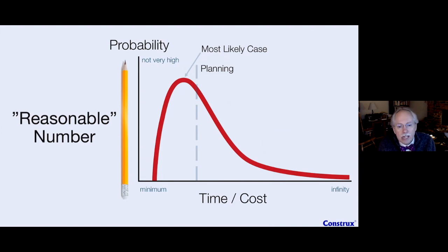It's also good for making decisions, right? Because it's a reasonable number to make decisions based off. And the kind of decisions we tend to make off the planning number is not when it will be done, because that's not the decision that makes sense. Promise number, we can always promise it will be done by, but the decision we're making at the planning number is like, what should we start with a budget? What should our budget be around, right?